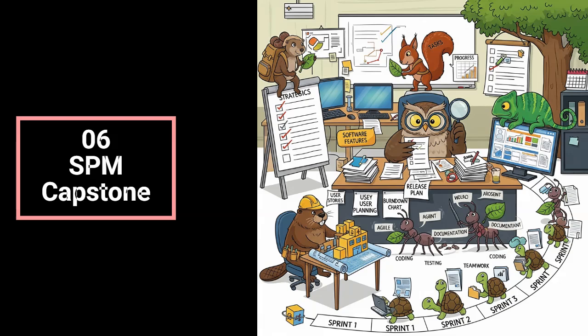Key agile metric. Which is basically how much stuff the team got done in sprint 1. Essentially, yes. How many story points they completed. Knowing that helps you make a more realistic plan for the remaining sprints. Right. You adjust your forecast based on actual performance. Precisely. Okay, week 5. Sprint 2, execution and planning for sprint 3.